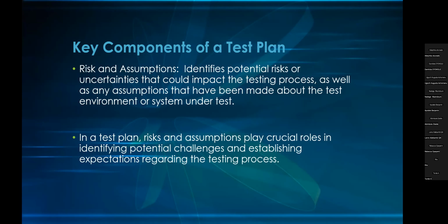Which brings us to risk analysis. Once risks are identified, they should be analyzed to assess their potential impact on the testing effort and the likelihood of occurrence. It helps prioritize risks based on their severity and likelihood. It also helps the teams to focus on mitigating the most critical risks first, like I said.